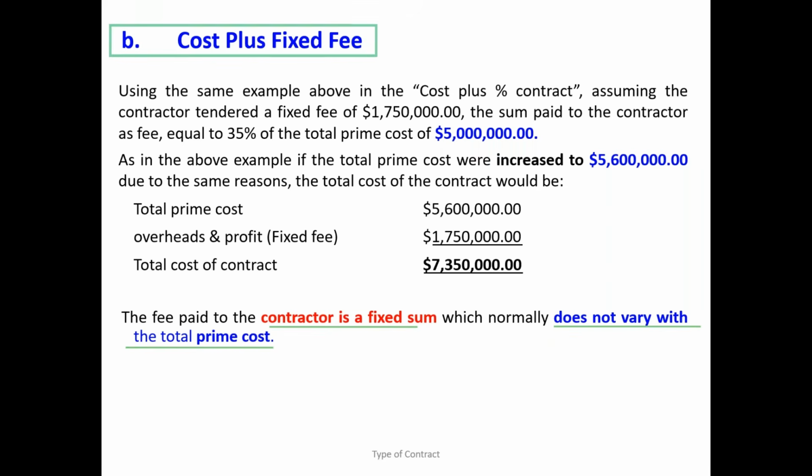So what is the motivation here? The contractor now will reduce the inefficient operation or waste of resources. Why? His motivation to make some profit was by spending more. But here, even though he is spending more money, will he make profit? Is it going to change for the project? No, nothing will change.